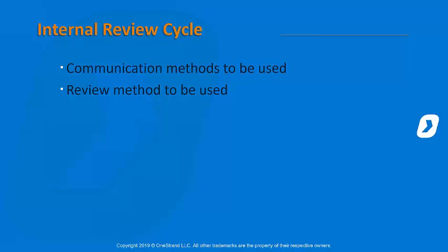So we do need to have that documented quite clearly, and also if you've got third-party suppliers or contractors, again, go back to that scenario of the 15 people, are we going to allow all 15 of them to communicate directly with the third party or contractors? And again, it would be a no, because you don't want contradicting pieces of information being sent through that mechanism. So we do need to look at our internal QA processes and internal communication processes to make sure everybody clearly understands what is that communication flow.